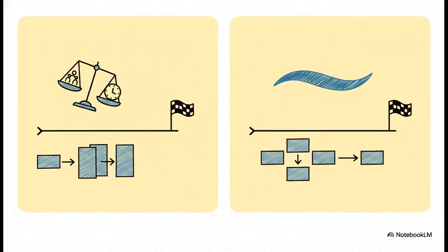So this brings us to a huge strategic decision. You've got two main tools here, leveling and smoothing. Resource leveling will solve your resource conflicts, but it can come with a massive cost. It can actually change and extend your critical path, delaying your whole project. Resource smoothing, on the other hand, is the safer play. It only uses the float you already have, so by definition, it will not delay your project's finish date. But the trade-off? It might not solve all your resource conflicts. So you have to ask, what's the one thing we absolutely cannot compromise? The deadline or the availability of our key people?